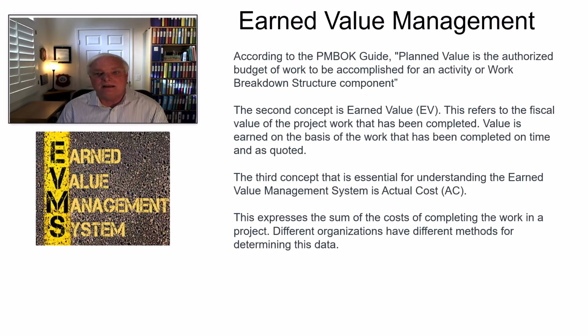In the PMBOK guide, plan value is the authorized budget of work to be accomplished for an activity within the work breakdown structure. So plan value is not meant to cover things that are out of scope or things that have not been brought into the baseline yet, things that you may not have approved.